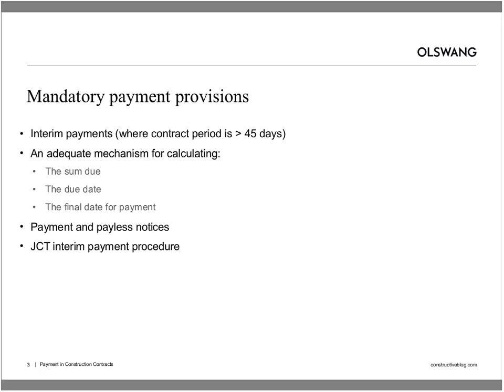All of this is underpinned by a payment notice regime, and just to quickly summarise that, I think the 2 really key things to remember about the payment notice regime are, firstly, no notice, no payment. So for the contractor, it's got to have a valid payment notice in place, or it's not going to be paid anything at all. And that the sum payable is the sum stated in the latest properly issued payment or pay less notice. And it follows from that the employer actually has an awful lot of control over the payment process, because it will normally be the employer that has the final say in terms of issuing the final notice.